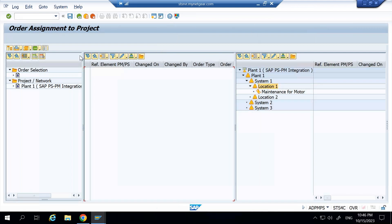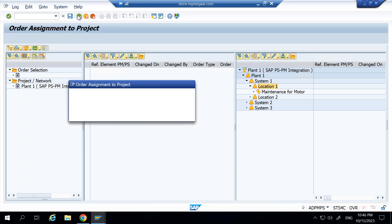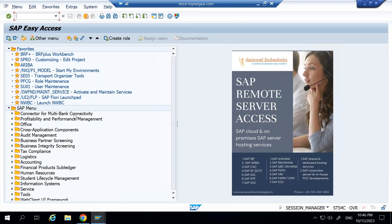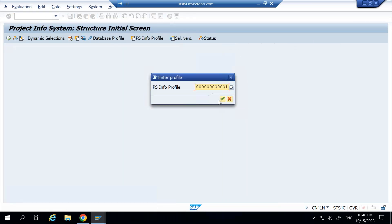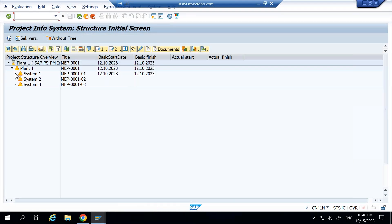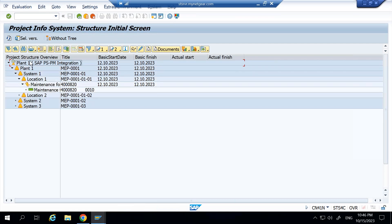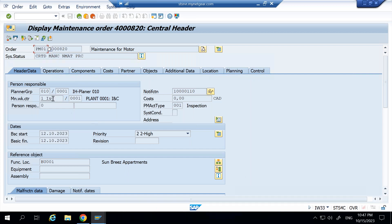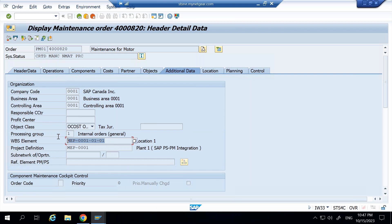Once the maintenance order is dropped onto the WBS element it is assigned there, and I save the changes. To verify the assignment, I go to transaction CN41N, enter my project, and execute. I open the structure and can see the assigned maintenance order. Double-clicking on it navigates to transaction IW33 — the maintenance order display. Under Additional Data, I can now see the WBS element is populated. This is how you assign a maintenance order to a WBS element.